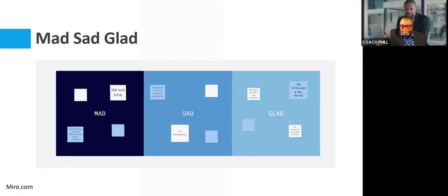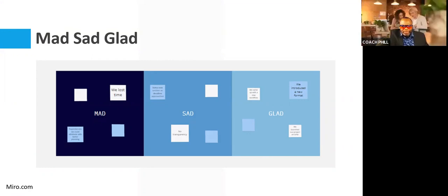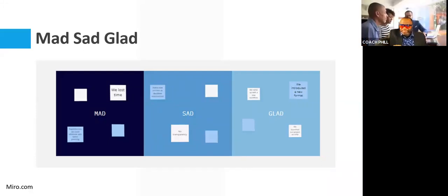What are you mad about? What are you sad about? What are you glad about? Everyone will take time out to write the observations on sticky notes, and they'll stick the notes where they think it best fits.